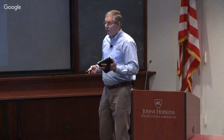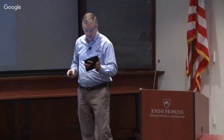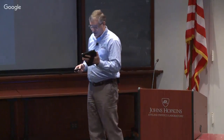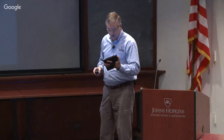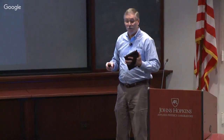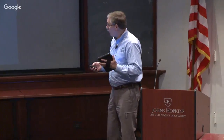Now, one note I need to make here is, although there have always been some overlaps in techniques and tools, it's important to know that Lean Startup Method, or LSM, is not the same as Lean. It's not the same as Lean Project Management or Lean Engineering or Lean Systems Engineering. The Lean Startup Method techniques are meant to help quickly and collaboratively prove out the feasibility of a product or service, and it's used to enhance and improve the initial planning of any project by creating this set of project focus mechanisms. After that, the project can be plan-driven, waterfall, agile, lean, or whatever, but they still can all benefit from going through this hybrid approach to get their initial work items and their project focus mechanisms.